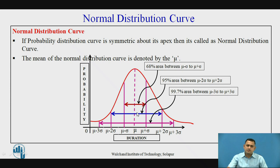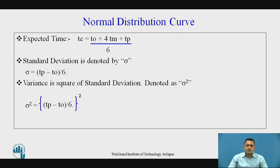The range from mu minus two sigma to mu plus two sigma covers 95 percent of the overall area, and the range from mu minus sigma to mu plus sigma covers 68 percent of the overall area. These ranges are very important and are helpful to define the particular probability of the project. Here are some formulas for the normal distribution curve. The first is the expected time: te = (to + 4tm + tp) / 6. The standard deviation is sigma = (tp - to) / 6, where tp is the pessimistic time and to is the optimistic time.